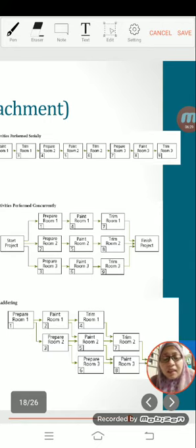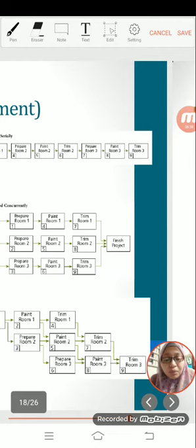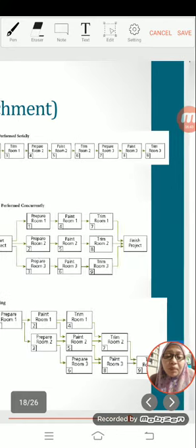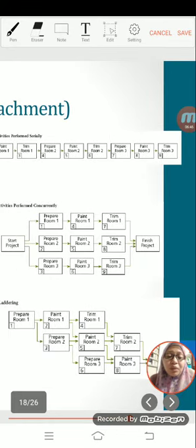On the second day, you use 2 persons. On the third day, you use 3 persons. The next day, you use 2 persons and 1 person on the last day. So how many people do you use here? You use 3 persons, but only for one day, compared to figure number 2, the middle figure, where you use 3 different persons for 3 days.